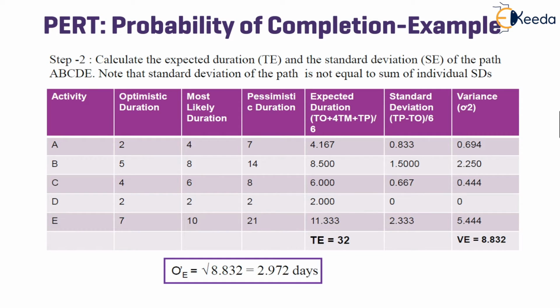The sum of these values will give the project duration since all activities, that is A, B, C, D, and E, are on the critical path. Here, the total sum comes to be 32. Hence, the total project duration or the first solution to the problem is 32 days.